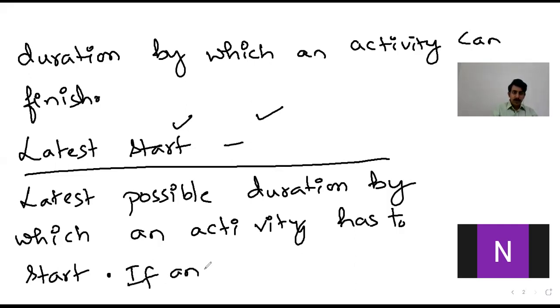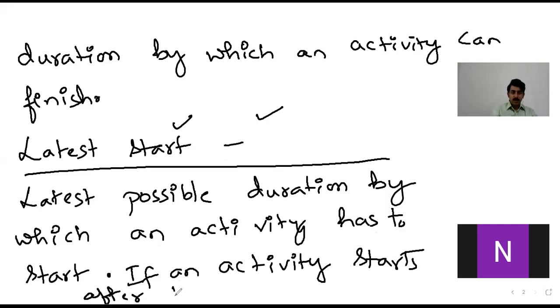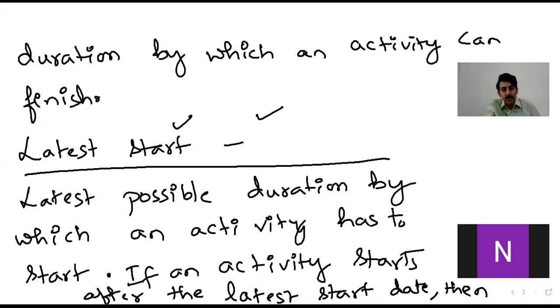So what will happen if an activity starts beyond this latest start duration? If an activity starts after the latest start date, then the project duration will be delayed.